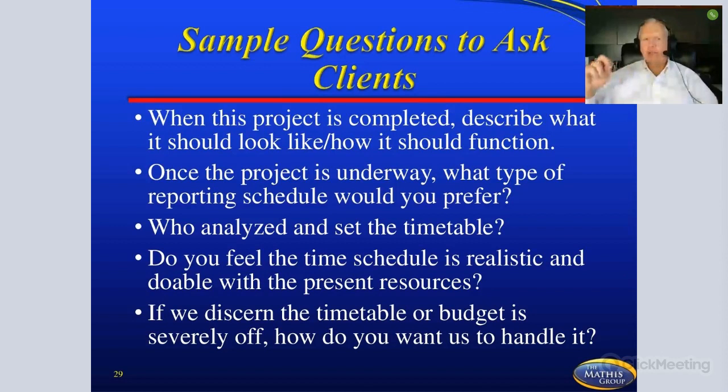When the project's completed, what should it look like? How should it function? Now, let me talk about this for just a second. This is a very important question because they're describing the end result of that project. So when they describe this project, everything they say here is going to be very important because as you interview them, the requirements they're giving you should be driving toward that question. Once the project's underway, what type of reporting schedule would you prefer? This is part of your communication plan.